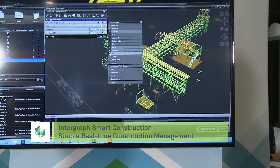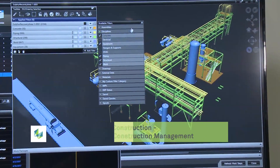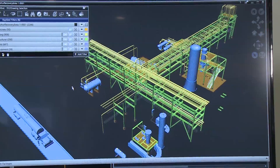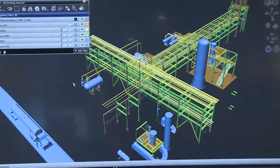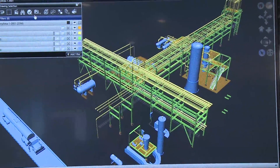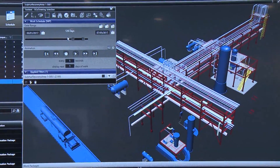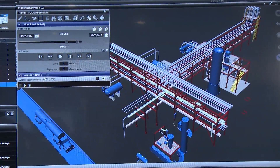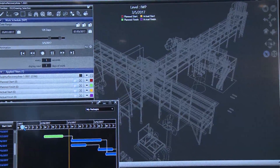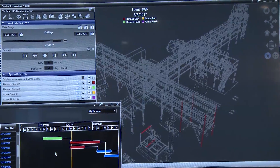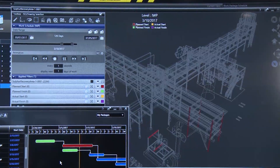Here I am filtering the model for the different disciplines, which allows me to easily see what my work packages may look like. When I enable the work schedule animation and play that, it allows me to view the planning of the work packages in a manner that allows me to plan ahead and prepare.